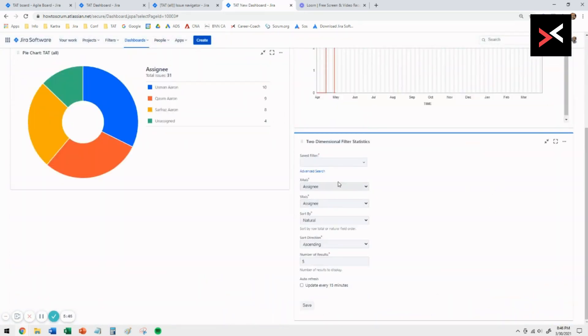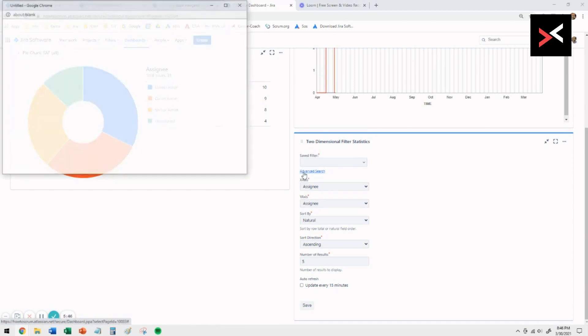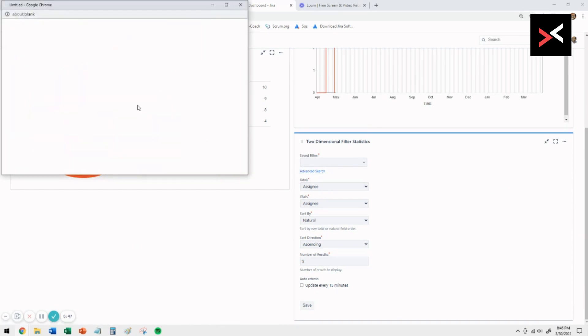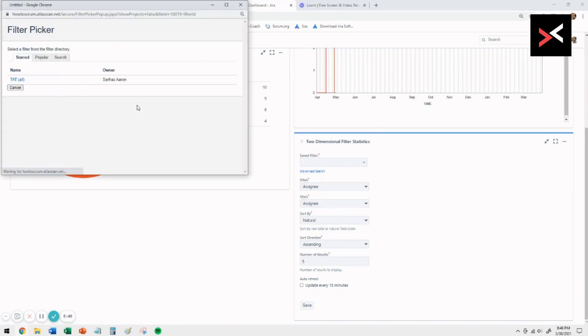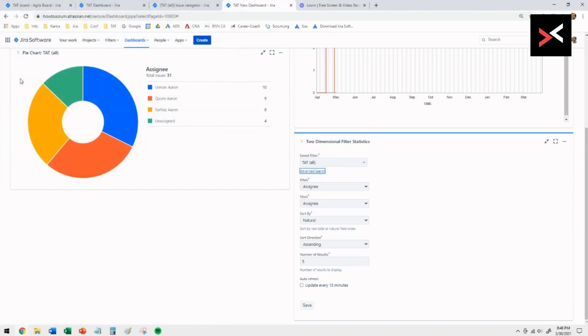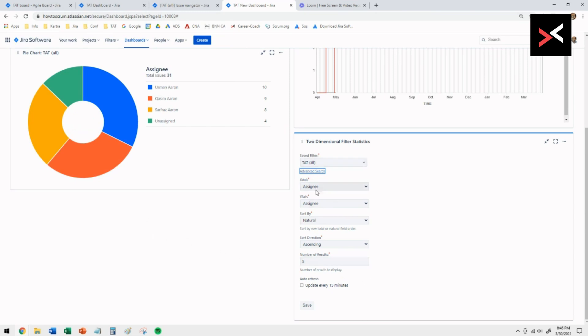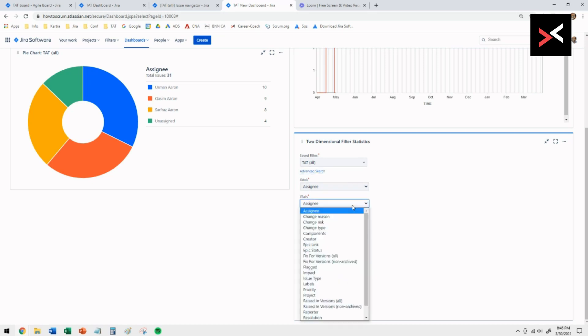You just need to select the filter, again the one we created earlier. Click on that. Then you've got the options for the X and the Y axis. We're going to have the X as the assignee and the Y we're going to make that into status.